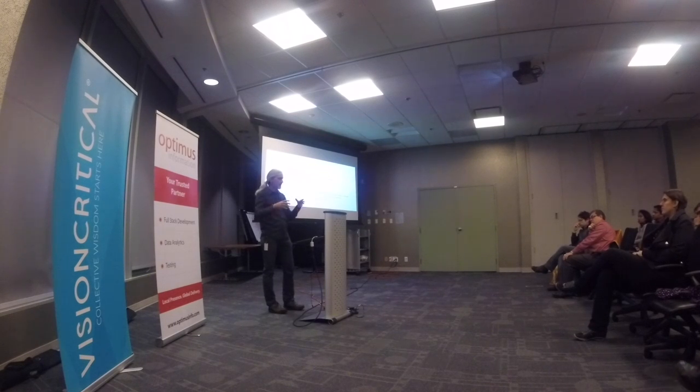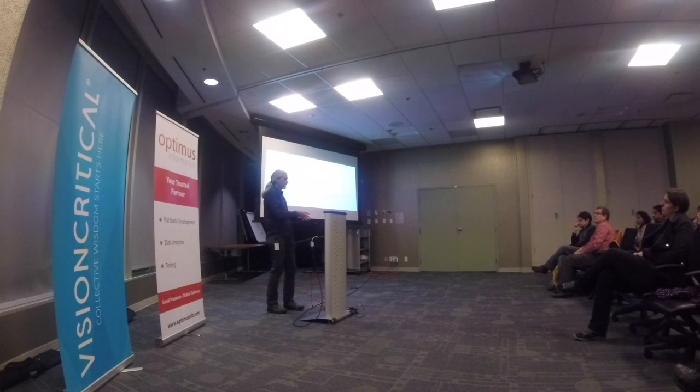Then there's the test case, test result type mapping back to the risk, to talk about that no-go decision, that release criteria situation where, okay, here's the testing I did, in the sense of here are the risks I understood and identified at the very beginning, preferably with the other folks in the room. And here's the test I did to mitigate this risk, and you can see these test patterns, and I focused these tests on all of the high priority areas. And again, talk about that idea that I worked through them from high to low, and maybe I didn't get to the lows, but here's what I did cover and what that means.